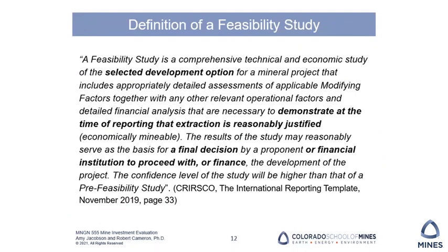Going on, the international definition of a feasibility study is a comprehensive technical and economic study of the selected development option for a mineral project that includes appropriately detailed assessments of applicable modifying factors, together with any other relevant operational factors and detailed financial analysis that are necessary to demonstrate at the time of reporting that extraction is reasonably justified, or it's economically mineable.